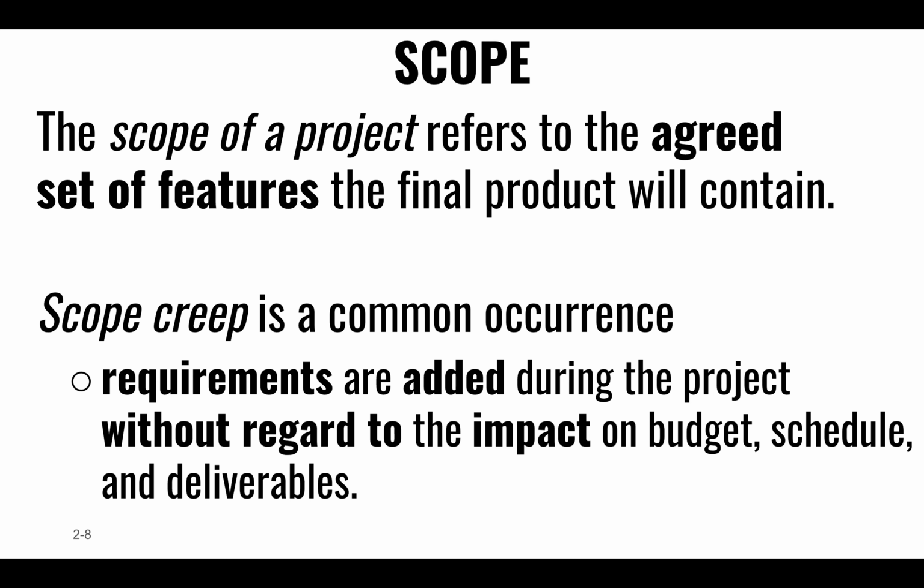That we can agree, all right, this is what we're going to be building. And that scope, unfortunately or fortunately, changes over time, right? The body of work that we need to be building changes over time. And everybody in the organization needs to understand that it does change over time, right? You can't just pile on more and more scope and assume that the project is still going to be within the same budget of time or financially.